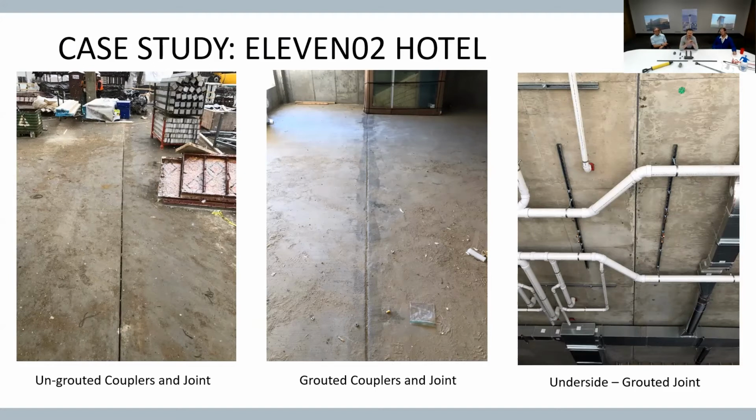On the far right, this is a picture of the underside of the top podium slab, and it clearly shows how beneficial not having a 4 to 8 foot wide gap in your slab is to other trades. This work would not have been able to be completed at this point in time if there was a big hole in the slab and all the formwork left in place. It's a clear example of what our product does and how beneficial it is.